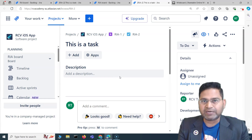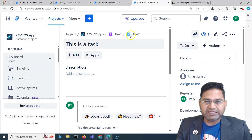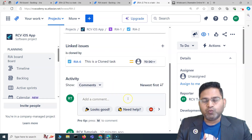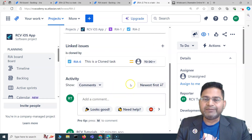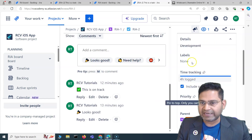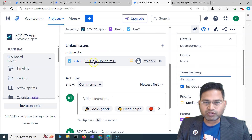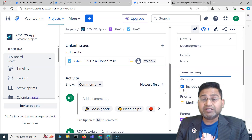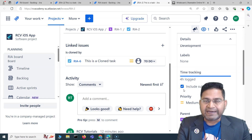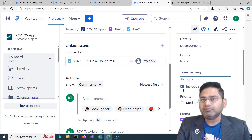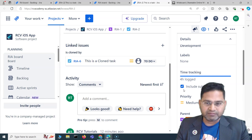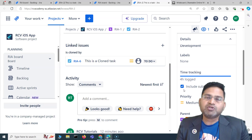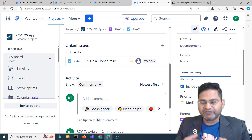For example, this particular issue has comments like 'on track, looks good' — those comments won't get cloned. Time tracking details also won't be cloned; the new cloned issue should not have the logged time from the original. Comments, issue history, and time tracking are all very specific to that particular issue and won't carry over.